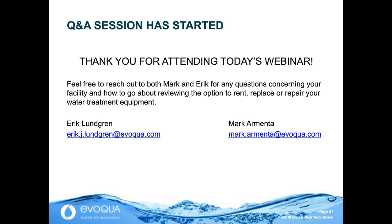And as a part of that evaluation, again, you don't know what you don't know. If you don't know what your permitting costs are, your environmental health and safety requirements, and I speak to that one out of personal experience, I didn't understand two factors, the cost factor or the resource factor, the time factor associated with EH&S of an ion exchange system. For me, several years ago, the way I stumbled upon that is Evoqua has a number of very large regeneration facilities, which are very large ion exchange systems where we regenerate the resin. In talking with those plant managers, we actually mapped out what our costs were. And I would not have known what a significant factor that was until we went through that effort. Again, that was several years ago.